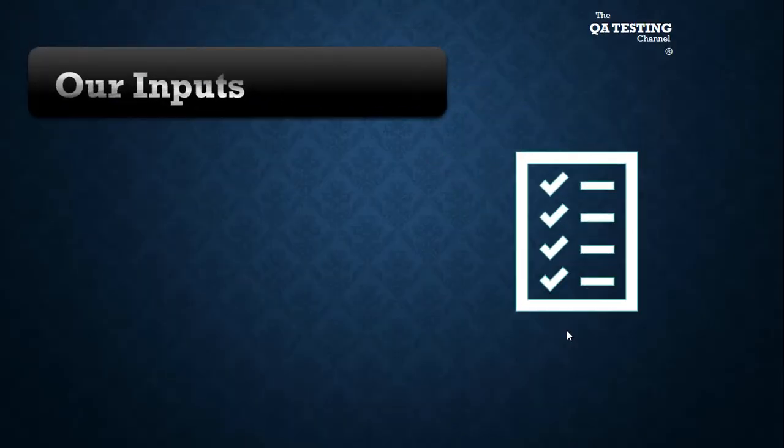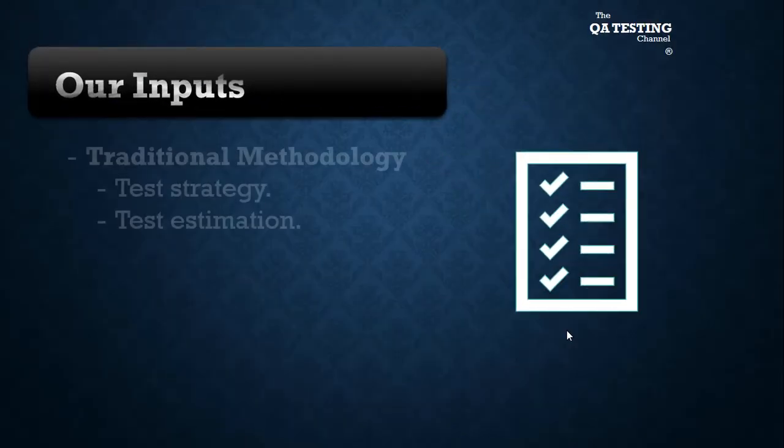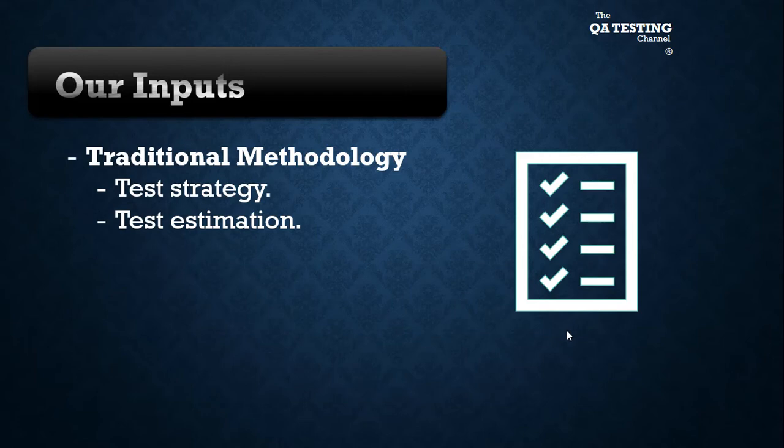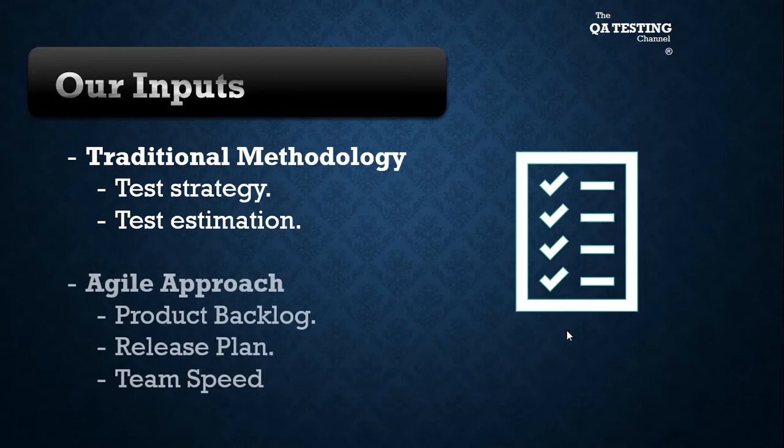What are our inputs? For traditional methodology: test strategy and test estimation. In the agile approach: product backlog, release plan, and team speed.